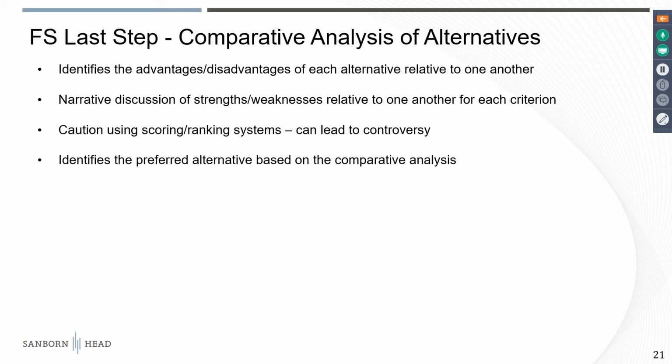Sometimes there's a desire to put some scoring or ranking systems in play, but I would just caution before doing that, because that can lead to some controversy. It implies a level of accuracy or judgment that might not be warranted given the subjectivity of the relative value of these alternatives.